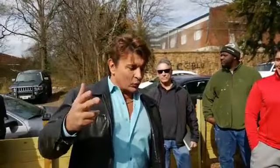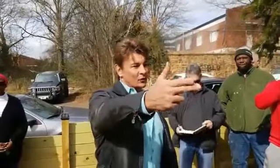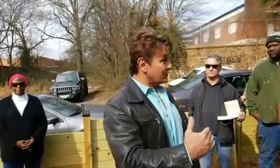The only thing that concerns me is some of the things I could have done better in the past, like when I was doing this house. My carpenter has a team of four. He was doing this house and another house for me at the same time, so he brought in like half a dozen people I'd never seen before. I said, dude, do these guys know what they're doing? That alarmed me. So I said, I'd rather you take another week or two on my jobs and take your time than try to rush it with people that are not skilled. Those are the ones that get you in trouble.